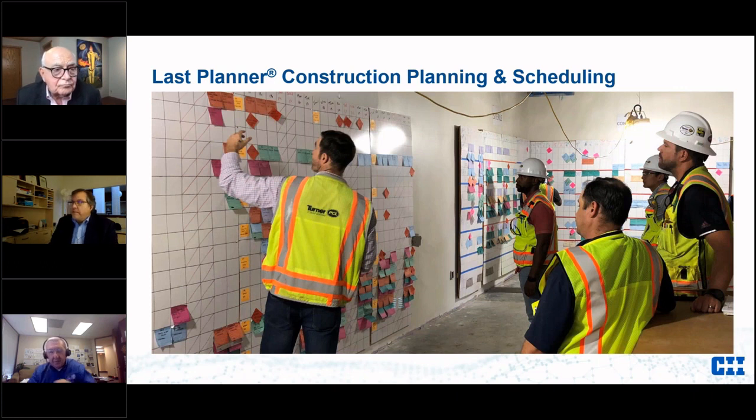Perfect. Let me jump in there too, Fernando. We have something similar. We're not as visual. I've tried to get visual boards up, and have not been very successful. What we have done is we've taken our P6 schedule on engineering and design, and we've actually got that into a spreadsheet format, and you can sort it by 2 or 4 week increments.